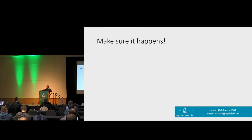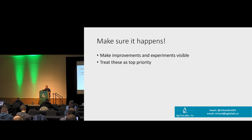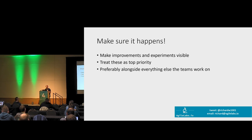Make sure you capture the actions you're going to try. Make sure they're visible — you've agreed that this thing is a problem, you've agreed you're going to tackle it and how you're going to tackle it, so make sure everyone knows. Anything that's slowing the team down should be your top priority. You need to make a link between your retrospectives and your planning — if you're going to try doing TDD next week, you need to account for that taking time. If you can put these things somewhere visible that everyone can see every day, that's great.